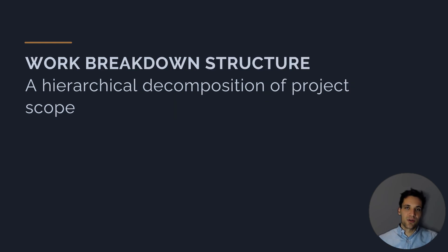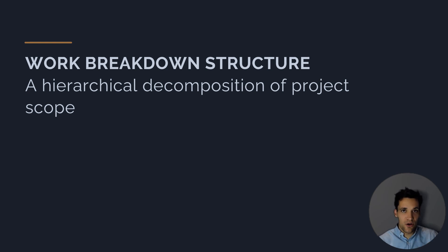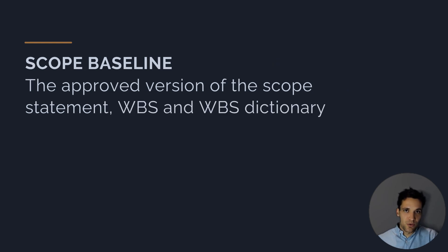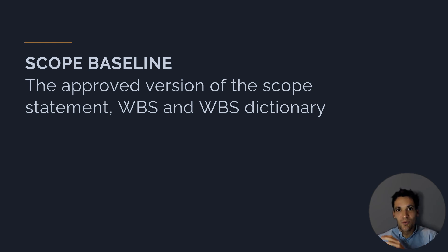To help us define and understand scope, we use a tool called a work breakdown structure — a hierarchical decomposition of the project scope. For example, we take our bridge and break it down into all core components: design work, earthworks, structures, roadworks, line marking — all these activities broken into component pieces across multiple layers, until we have a full work breakdown structure dictionary. Once we've created our project scope statement, our work breakdown structure, and our WBS dictionary, we bundle these together into our scope baseline — the clearly defined and detailed works we're going to do to complete our project.